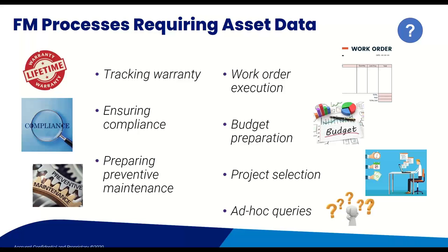Project selection. Also an interesting one. So, for instance, you have a budget that you can spend on improving the energy efficiency of your building. And then you are presented with the question, well, what should we do? Should we insulate all the roofs? Or should we replace all the windows with double glazing? And in order to make that decision, you need to weigh the expected benefits, savings of that change against the cost of it.